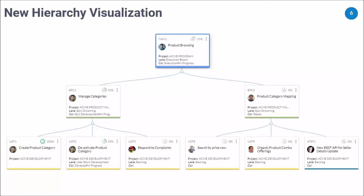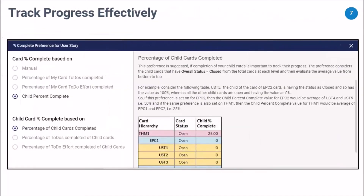How is work progress computed? We have introduced a whole set of preferences that allow you to set them for individual work item types. For a theme, you would like progress based on the number of cards or epics completed under it. For a user story, you would want percent progress based on the number of to-dos completed or hours remaining. These are the ways progress can get computed automatically on different types of cards — be it theme, epic, user stories, or technical stories.